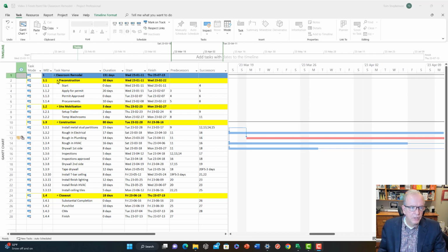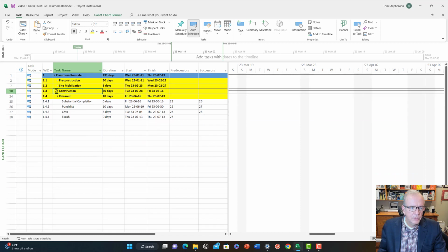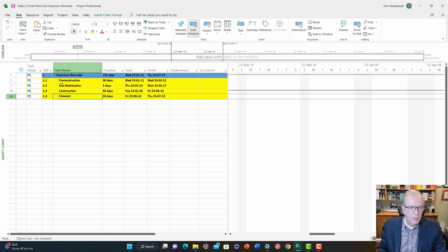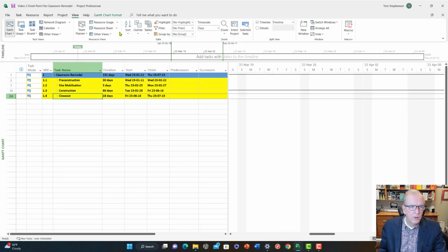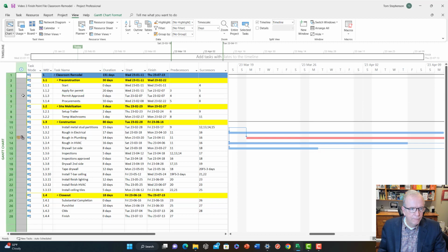And a work breakdown structure simply means you can roll things up, you can organize components of your project so that it's easy to follow. You've got the overall project, and here you've got lower levels. You can go to the View tab. You can open them all up fairly quickly by going to Outline and say All Subtasks, and then everything should open. I can see here that this is the indicator column, and this is very helpful.